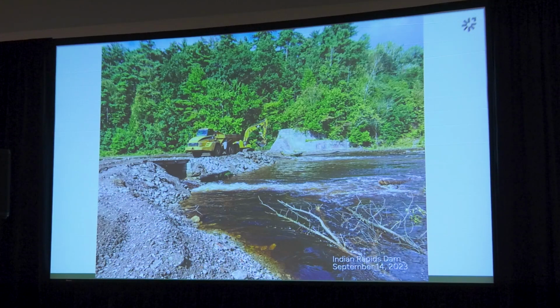So this was a really nice sequence that they had. You can see their water control included opening up a portion of the dam to allow water to pass through, so that they were largely working in the dry where they were removing the concrete from the dam.